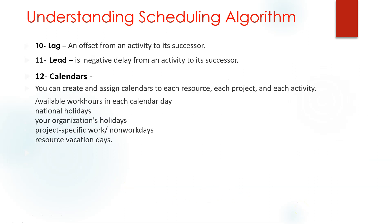Lag is an offset of an activity to its successor — it means waiting time. For example, you do excavation, wait two or three days, and then start placing your formwork. This is called lag. Lead is the opposite of lag; it is a negative lag, meaning you create concurrency between two activities.